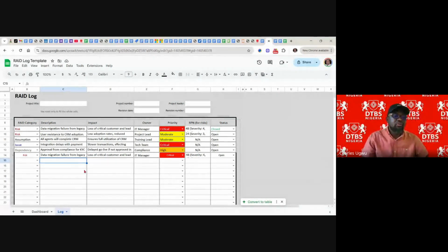And yeah, you continue every week. We brainstorm. We first look at all the risk elements. Anything as any expected risk, anywhere we brainstorm. If we don't find any risk, then we'll move on. If we find risk, we'll capture it, we address it, we assign it to owner, and then the owner will decide on the probability, and we can use the RPN in order to make sure we capture the right severity, and then we leave it open.